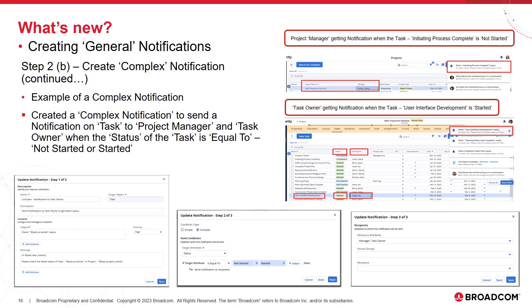Example of a general complex notification: we created a complex notification to send a notification on a task to the project manager and task owner when the status of the task is equal to Not Started or Started. In Step 1 of 3, we selected task as the target object and defined the subject and message. In Step 2 of 3, we selected Status as the target attribute and set the condition as 'is equal to Not Started or Started'. In Step 3 of 3, we selected project manager and task owner as recipient resource attributes and saved the definition. A notification is sent to the project manager and task owner when the task status changes to Started or Not Started.